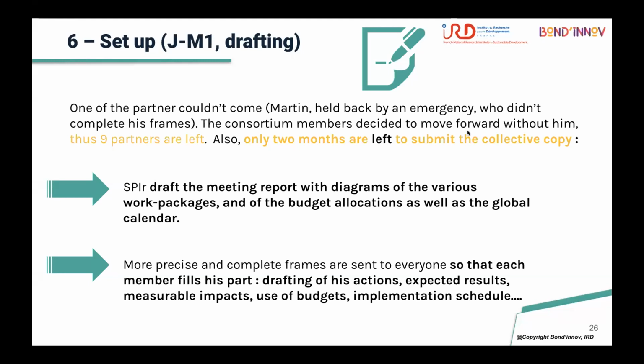After the meeting, a more precise and complete framework is sent to everyone so that each member fills in his part. As you can imagine, the details of the activities, expected results, measurable impact or indicators, use of budgets, implementation schedule, etc.